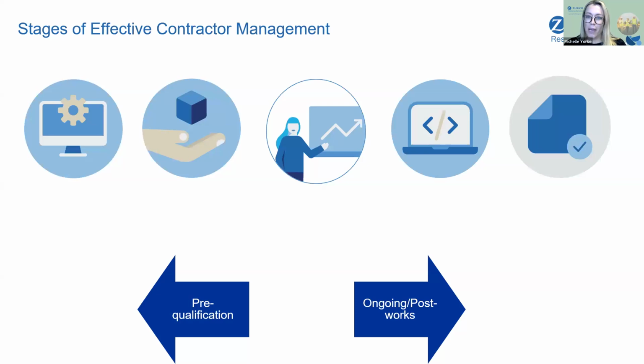So effective contractor management, including for charities and voluntary organisations, involves a structured process with these 5 key stages. So in the first one, planning and selection, potential contractors are identified, assessed, and pre-qualified based on their experience, qualifications, maybe also their financial stability and their past performance. Next, during contract definition and award, the scope of work and safety requirements are clearly outlined, terms and conditions are set, and the contract is awarded.